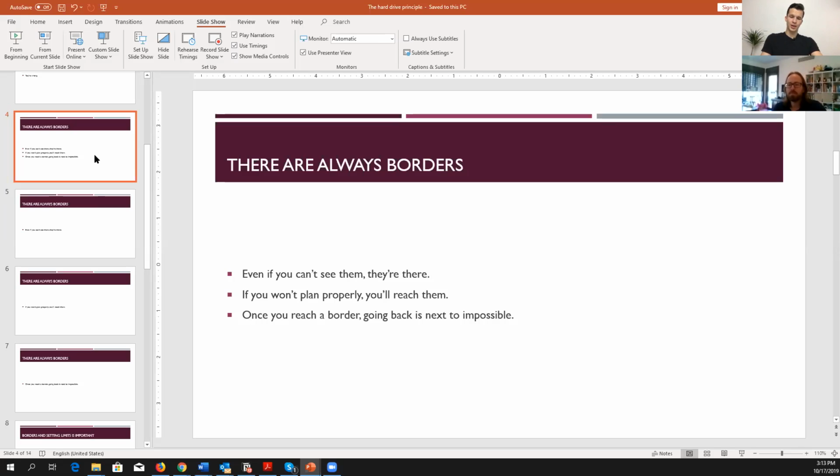Yeah, from my experience, what works really well when I was managing some social media for local clients here in Czech Republic is quantifying not only the bottom number of, for example, how many stories I will deliver, but also the top number. So I will deliver, for example, 4 to 8 stories within a week, and that's really measurable. That's really precise. And every party knows exactly what to expect from each other.